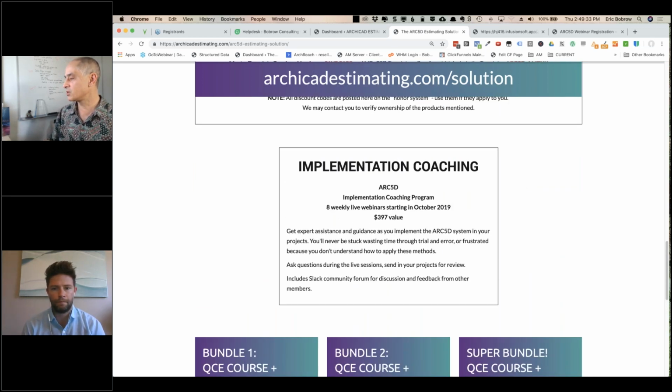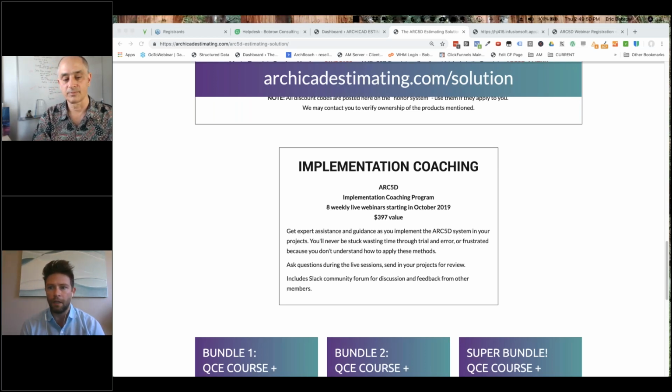Now, some questions I'll just pass over to John. Steve Pribble says, is the cost of labor intended to be included in unit costs? So yes, in the base unit cost that I was trying to explain, that would be an all-in number where the material, the labor, and the equipment, and even sometimes subcontracts are lumped in.